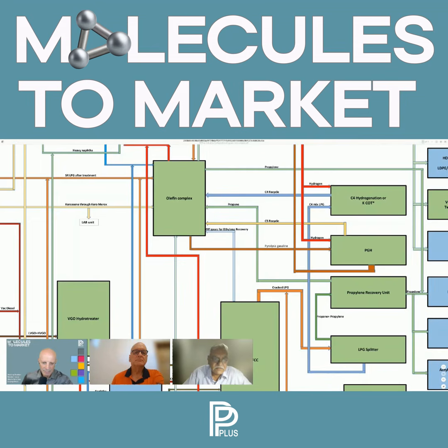To the bottom line, I will add some factors. If it is OB, I will not take it in cost. If it is EPC, I will add some factor. If it is EPCM, I know what the cost is. And then there can be a strategic document, which we call the project implementation plan, which is developed at this stage and forms a part of my detailed feasibility report. So the board can also be apprised as to how I am going to implement the project, control it, what the basic considerations are, how I will keep a hang on the cost and schedule, etc. These things are also put together in the project.